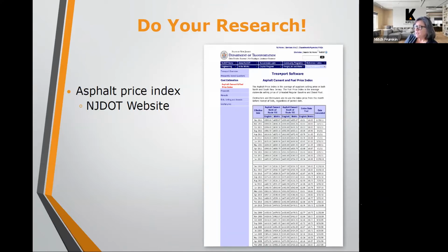In the time I've been doing pavement projects, I have seen one decrease in price that helped the community in the end, but typically the price rises over time. Another change order that I'm seeing on invoices for pavement projects now is the fuel surcharge. There is also a fuel price index that is referenced by the Department of Transportation. So there is a way to see what that change is and compare it to what the contractor is charging you for fuel.